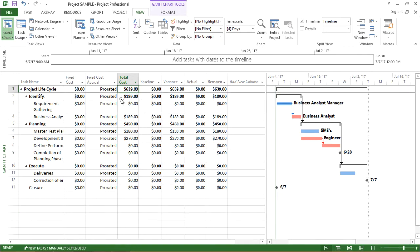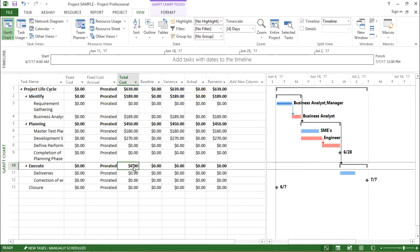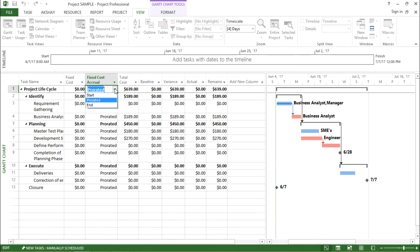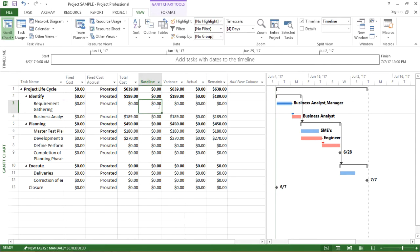Now out here it is showing me the total cost of the project lifecycle that is $639. So in this way, I can understand what is the cost involved in my project and it gives me an overall picture. What are the fixed costs? What are the fixed cost accrual - whether it's prorated, whether it's start, whether it's end. So this gives me an overall feature of the budgeting of my project.